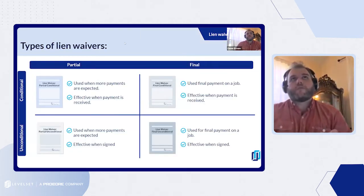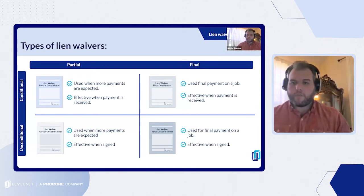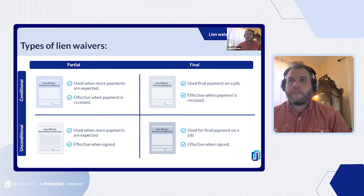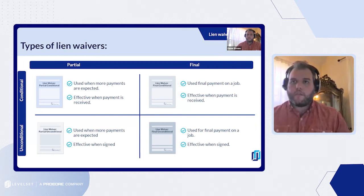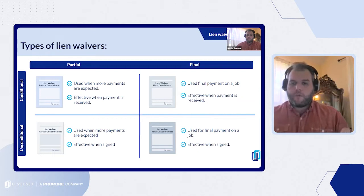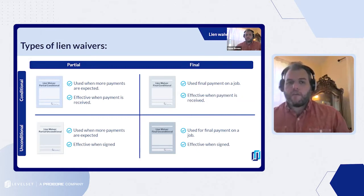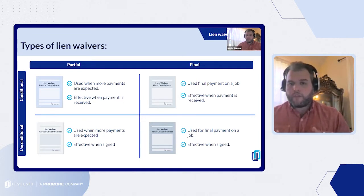Just a quick overview of lien waivers. We use this matrix to describe the different kinds of waivers that exist. Overall, depending on who's using them and how they're using them, they effectively are receipts. They protect the owner and the lender from any sort of lien claim because they have signed evidence of payment from across the entire payment chain. We use this matrix to describe the differences between partial waivers, final waivers, conditional and unconditional waivers, and we'll go a little bit more into that in the next slide.